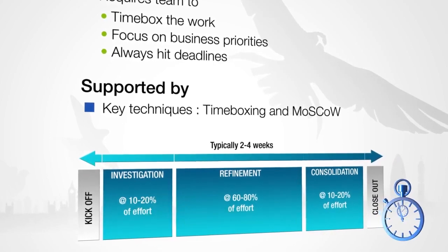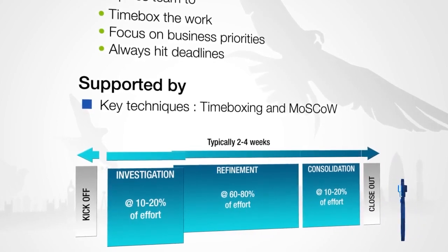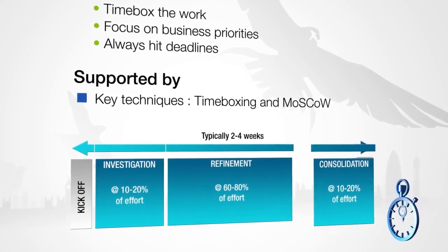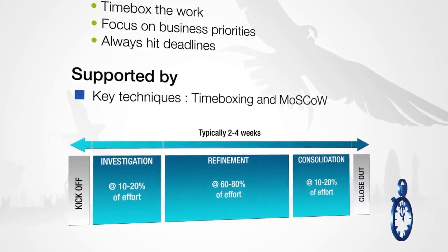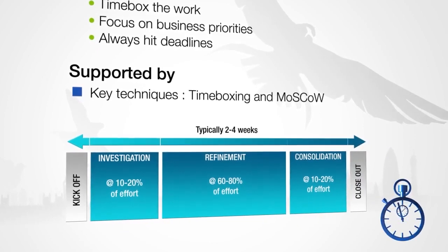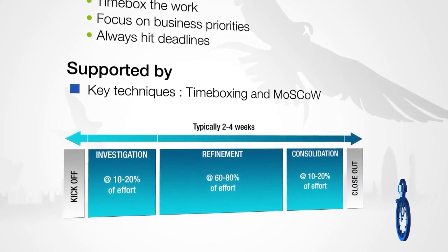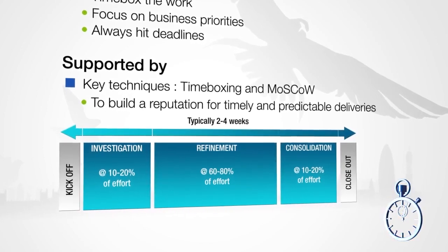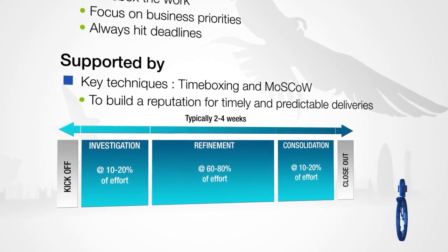Time boxing concentrates on delivering on time at the lowest level, which means on-time delivery at the highest level is guaranteed. MoSCoW prioritization of the requirements within the time box and continually reviewing what can be achieved in the agreed time frame ensures that time boxes finish on time every time.